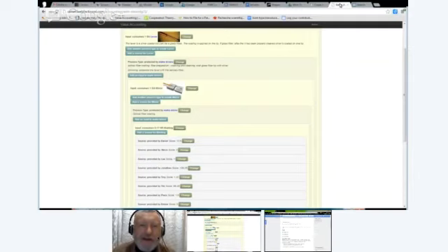I mean, it is and it isn't. You can understand it. I've written it from scratch several times. What it is, is recursive and fractal again. It's this little bit of code and it just walks through this structure doing the same thing at every level. Back schedule, explode, net out whatever you already have in inventory, and then just keep going. There are many books written about this algorithm. But basically, it's a really well-known thing.